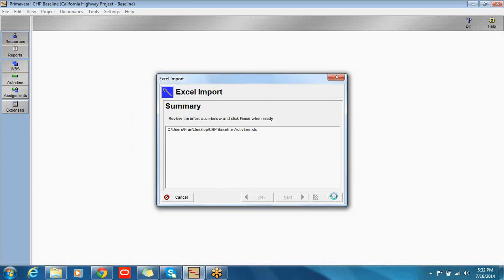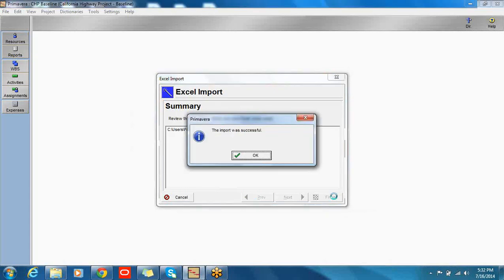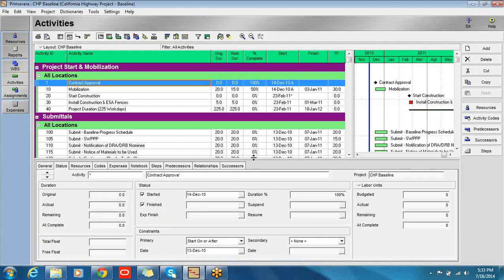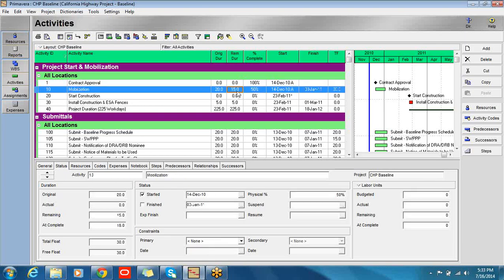If anything goes wrong, you'll see a blue hypertext that will let you know what went wrong. Usually it's because you did not type the actual start and actual finish date formats correctly. If that happens, just reopen the spreadsheet and try it again. The first activity — Duration Percent Complete — is obviously 100, and you see the actual start date. For the second one, I left 15 days. This was a physical percent complete, as we can see in the bottom window, and I called it 50% complete in terms of progress. And once again, you see the actual start date.